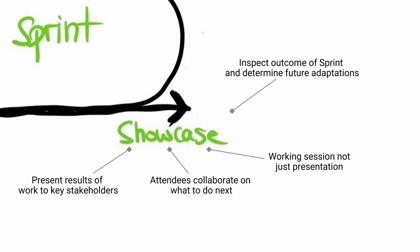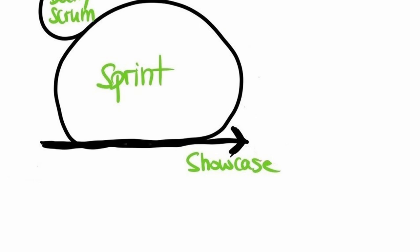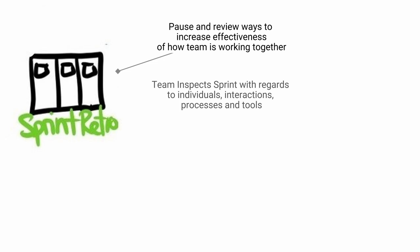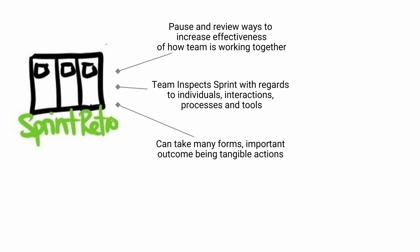Sprint retro. The purpose of the retro is to pause and review ways to increase quality and effectiveness of how the team is working together. The team together inspects how the last Sprint went with regards to individuals, interactions, processes, tools, and anything else that is relevant. This event can take many forms, with the important outcome being tangible actions that can improve subsequent Sprints. Typically this is an hour long for a two-week sprint.